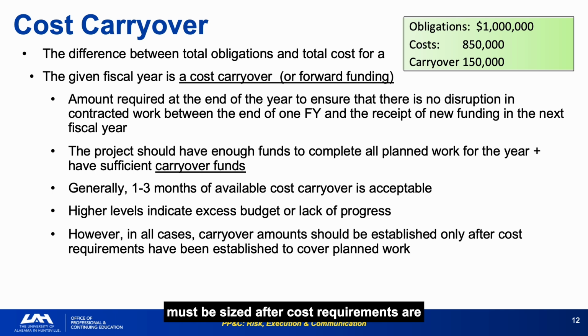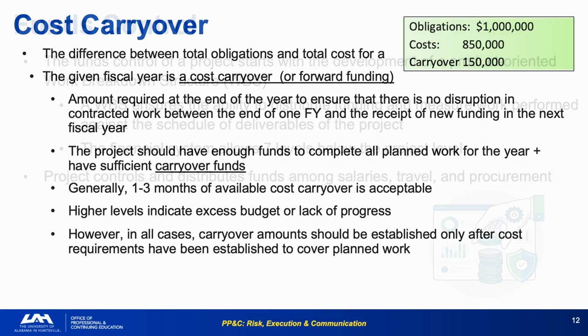Carryover must be sized after cost requirements are established for planned work, rather than being set arbitrarily or driven by a desire to avoid giving money back. Calculate your expected end-of-year carryover during the budget formulation cycle, not in September. If it is trending above 3 months, start identifying the underlying cause early so you can address it.